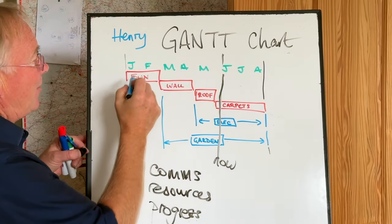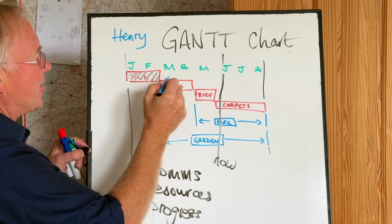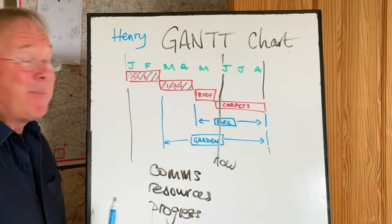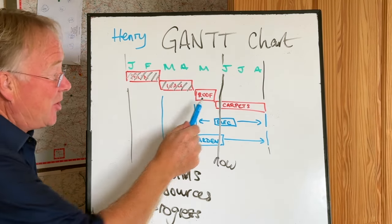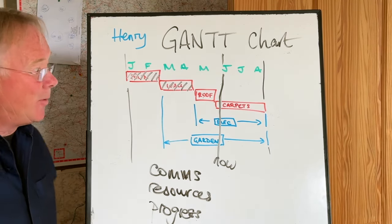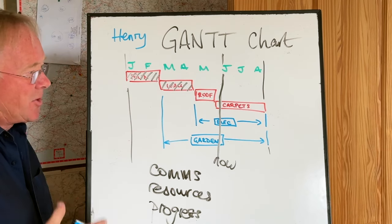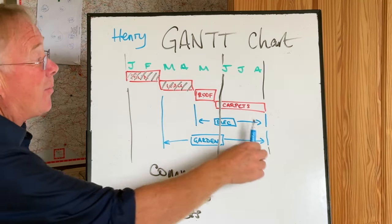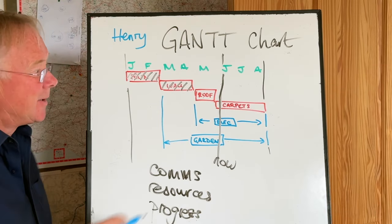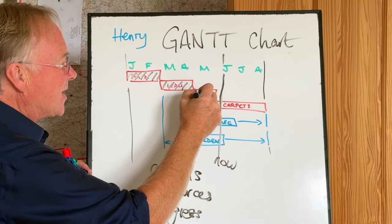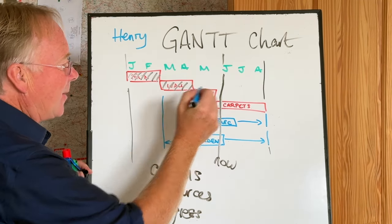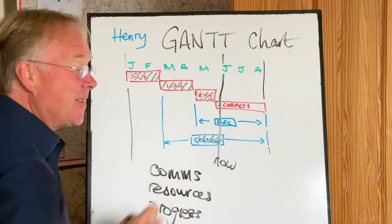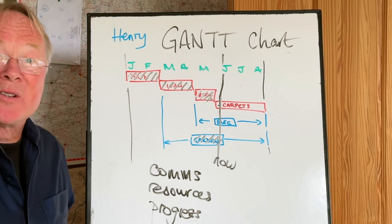In this case, we would hope that we've done the foundations and the walls. If it looked like we're not quite keeping up, it would mean we should have done the roof by the time we get to June. The project manager can immediately tell the project is running behind, and therefore we're probably not going to be ready by the end of August. What we want to see is that we've done the roof, finished the garden, and just started on the carpets and the electrical work — then we know we're on schedule.